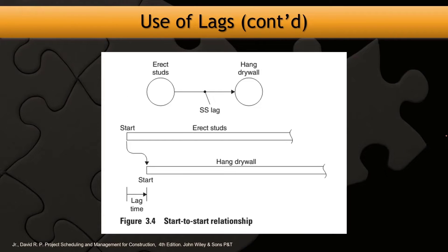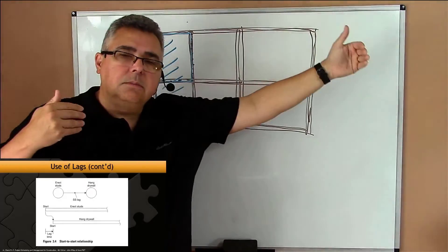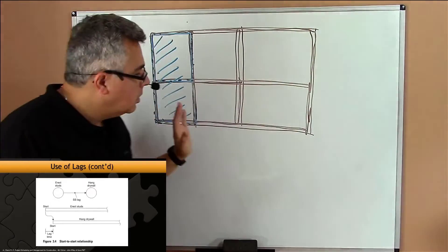Like, say if the worker finishes the frame in one floor or in one room, you can put the guys to hang the drywall. Once you finish a certain segment or certain part of the construction, you can start hanging the drywall.